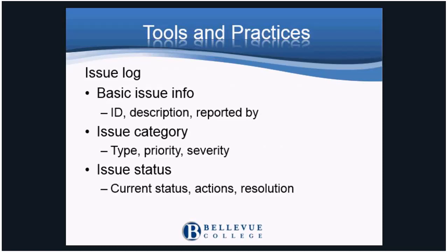Once the issues have been identified, the issue log becomes the source of what is being done and if the issue is being resolved. Work can be assigned and the feedback or progress can be recorded until the issue is resolved. The issue log becomes a rolling list where the current issues are managed and dropped to the closed section when resolved.